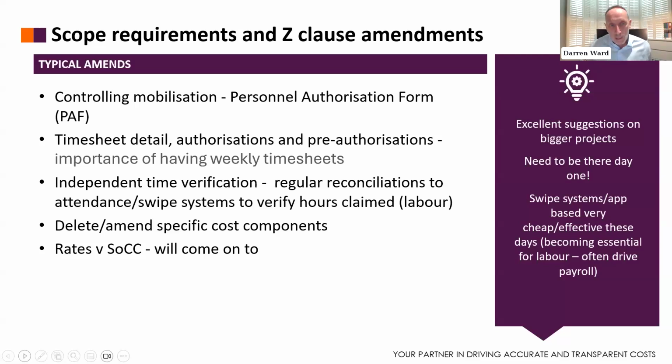So amendments do happen. Let's just touch on a few typical amendments. One we commonly see is where a client or employer is particularly keen to control the mobilization of people, usually staff. What we're looking at here is where a client would want to know that people are only brought to site whether A, they're in budget, or B, they have the suitable qualifications and experience needed.